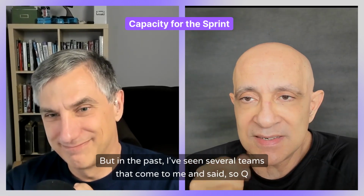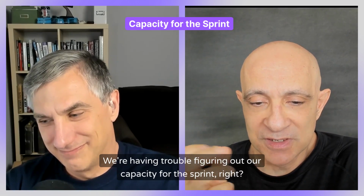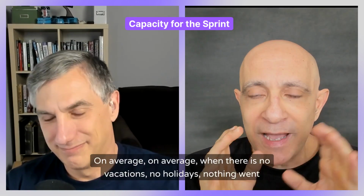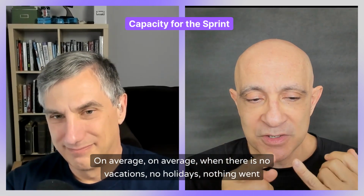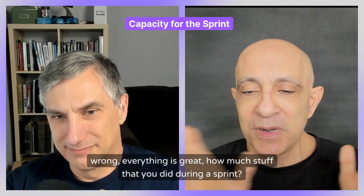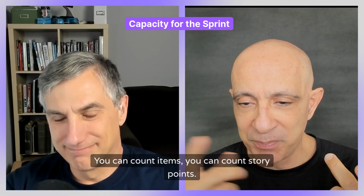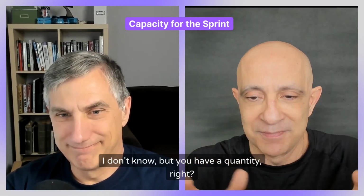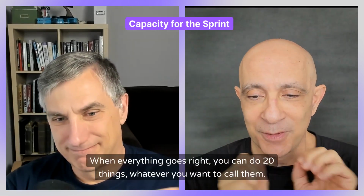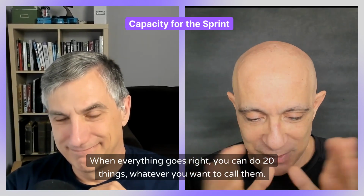In the past, I've seen several teams that come to me and say, "So Q, we're having trouble figuring out our capacity for the sprint." And I have a few easy ideas. Think about this. On average, when there's no vacations, no holidays, nothing went wrong, everything is great, how much stuff did you do during a sprint? You can count items, you can count story points, I don't know, but you have a quantity of something. So let's call it 20. When everything goes right, you can do 20 things, whatever you want to call them.